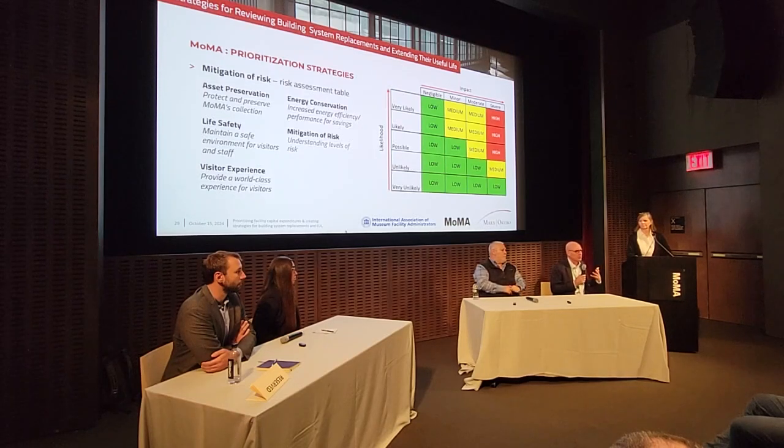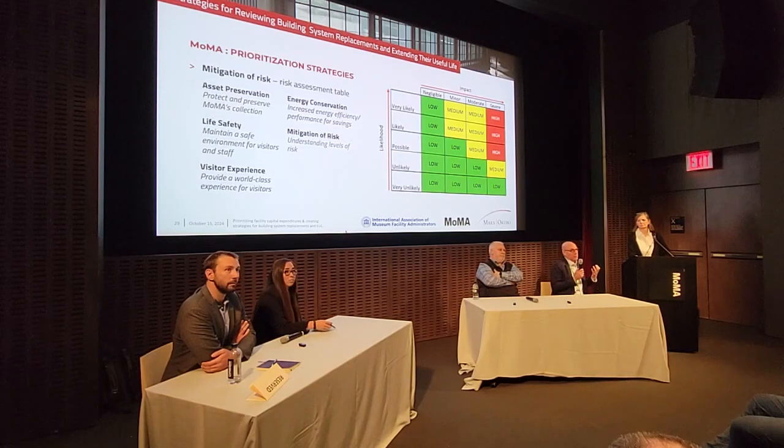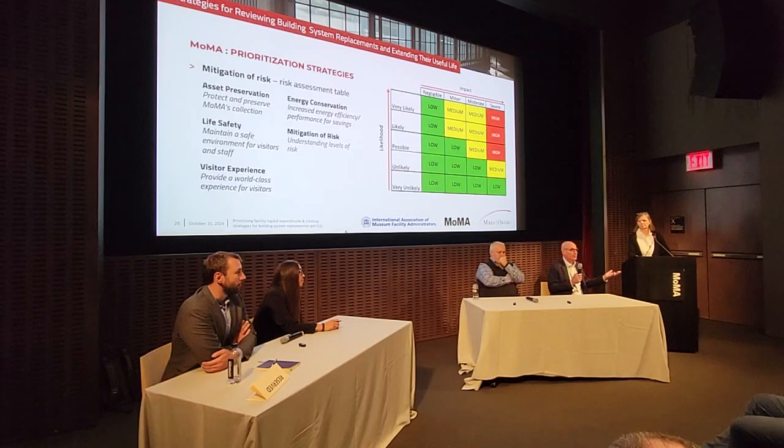The cost estimates that you're getting with an FCA are not what you would consider to be construction cost estimates in any way. They're really placeholders in a way, and you might have a square foot allowance, or they're using their best cost allowance numbers that they have. And sometimes you think there's even a big problem with something that there isn't a problem with. So we had projects that we had $300,000 or $400,000 on that we didn't have to do because there was a much quicker, less expensive solution.